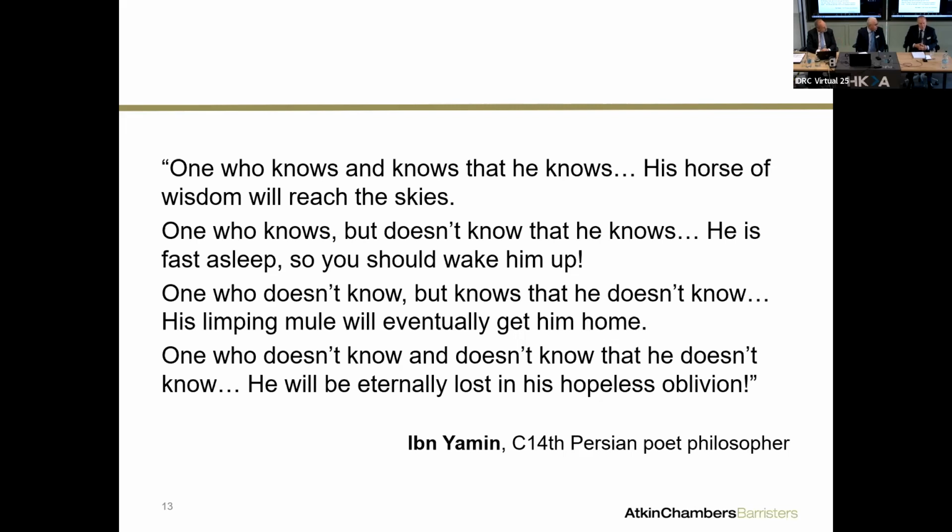I think from my experience, the plant is going to deteriorate once it's initially commissioned. You are going to achieve certain performance, and as James talked about, unfortunately, that performance is going to drop off for various reasons as the plant operates, hopefully until its 25, 30-year cycle of operation. I have worked with clients where they have had insurance-backed type guarantees. So not only do you have a guarantee of performance during the construction of the work and during the commissioning and during the defects liability period, but they've extended that maybe for 5 years beyond the initial operation of the plant on an insurance-backed scheme. That can be quite expensive, but that is one option a client can take.